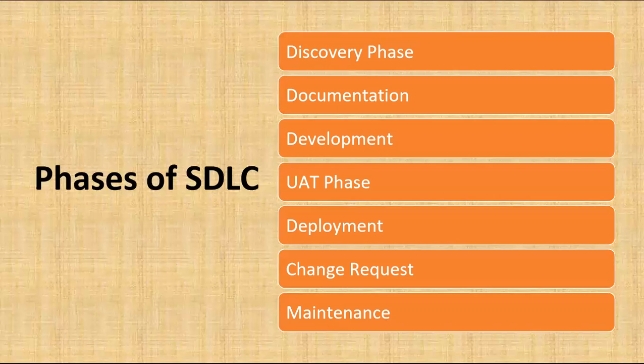So before going to the development, once the PDD and SDDs are done, we create a tracker, or we create a document called the estimation document. In the estimation template, we need to create the estimations for each stage, like development, testing, UAT, delivery. So as per the business process, whether it is a web automation, whether it is Citrix automation, whether it is SAP automation, whether it is a mainframe automation, whether it is Oracle automation, whether it is some other new OCR involved and all.